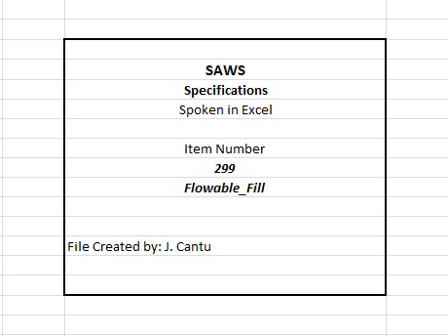299.3 Submittals. 1. All submittals shall be in accordance with engineer's requirements. All submittals shall be approved by the engineer and acknowledged by the inspector prior to delivery of materials and commencing any portion of the proposed scope of work. A. Submit proposed mix design. Mix design shall state the following information.